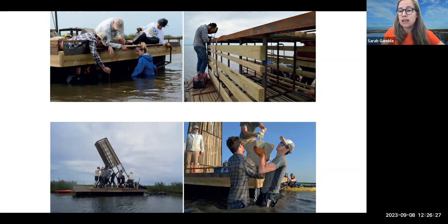So in this case, they really were going to only have 4 days on site to fabricate the project. So they built all of the components back in Austin and trailered them down. And they had to be very conscious of the depth of the water, that they were only going to be able to use a flat bottom boat to get them out to the site. And the site is about a 60-minute kayak paddle out to this location. So it's quite a distance.